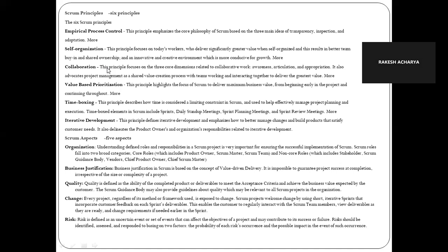See, I can pick up any random things, right? But if I'm working on one web application, and I'm working on the database, I'm working with the e-commerce, like adding an item. But if the user is not able to log into the application, nothing is useful. So as per the priority, I will first ask to create the functionality for the login screen. So that is a value-based prioritization. The product owner will say what is useful for the business. That is a value-based prioritization.